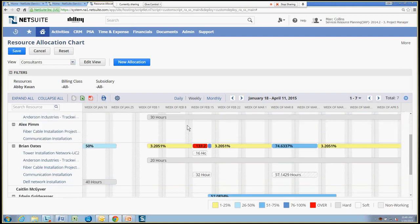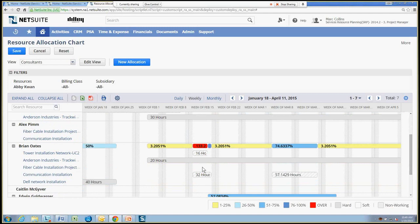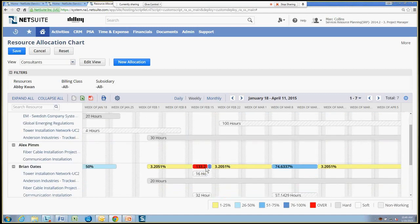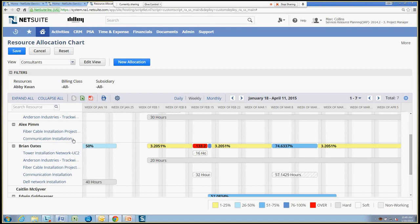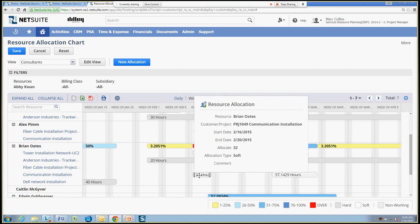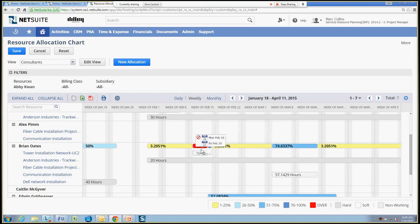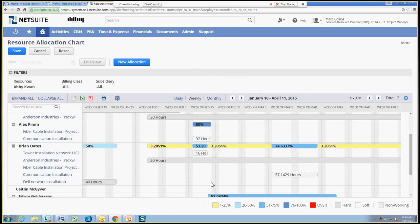So if I scroll down and I take a look at Brian Oates here, you see that he's over-allocated for a short period of time in February. So I can go ahead and take a look at other resources that may be appropriate for this same project. So the communication installation project here, he's got 32 hours. I see Alex up here is also a resource on that same project. He has the same skill level because I know that. So I can just go ahead and drag that up here and reallocate easily those 32 hours away from Brian and to Alex. Now neither of them are over their scheduled time.